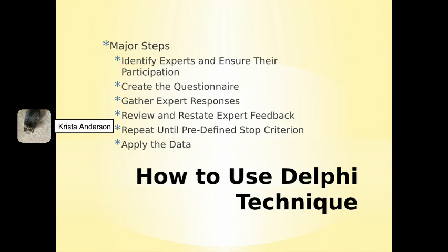The first step in applying Delphi Technique includes identifying experts and ensuring their participation. The experts do not have to possess experience doing the work or dealing with the risks under consideration, but they should be people who are familiar with the organization, the customer, and their mutual concerns. The second step is creating the Delphi instrument or the questionnaire. The questions should be specific enough to elicit information that is valuable, but general enough to allow for creative interpretation.